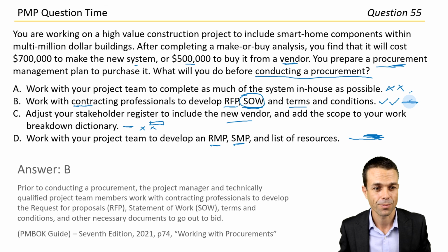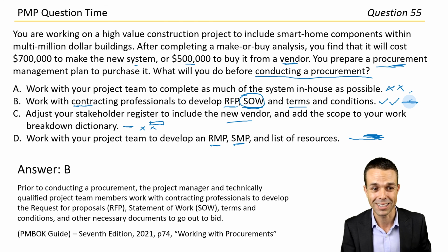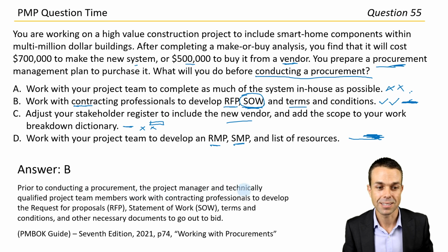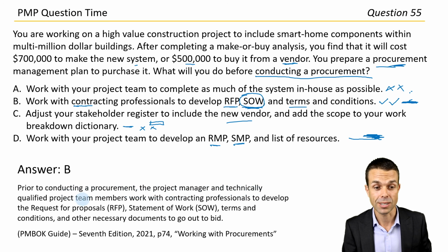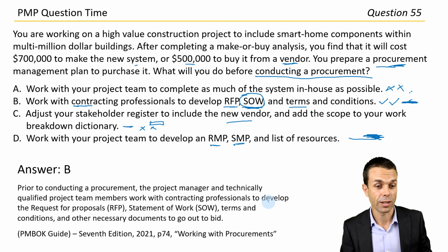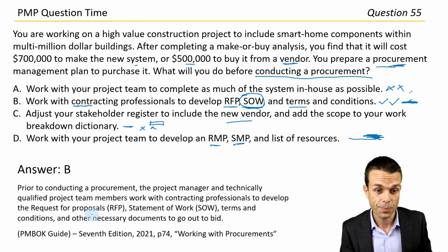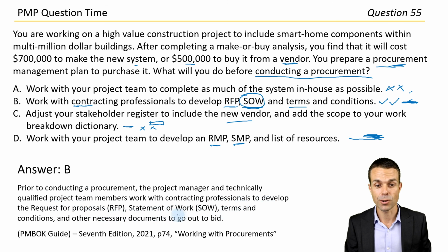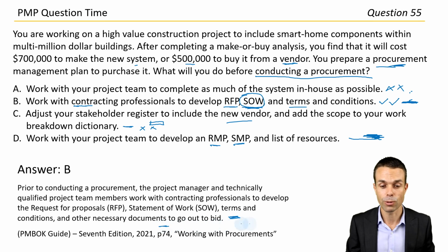Let's have a look. Okay, good. We got it right. But let's see if we get any tips here. Prior to conducting a procurement, the project manager and technically qualified project team members work with contracting professionals to develop the request for proposal, statement of work, terms and conditions, and other necessary documents to go out to bid. Page 74, working with procurements.